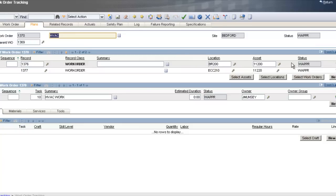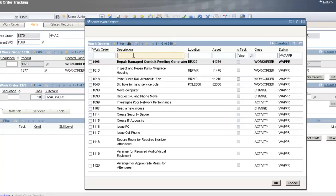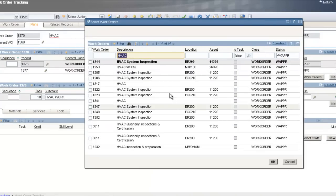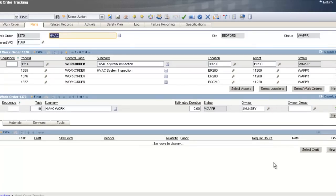I can also select existing work orders — you may have work orders already in your backlog that need to be done. I can assign them to this outage and get them all done at the same time. Click the Select Work Orders button, type HVAC in the description, and check the ones you want. This associates those existing work orders to this parent work order. Now I have parent work order 1370, which is a child of the overall project plan, with all the individual work orders already set up.